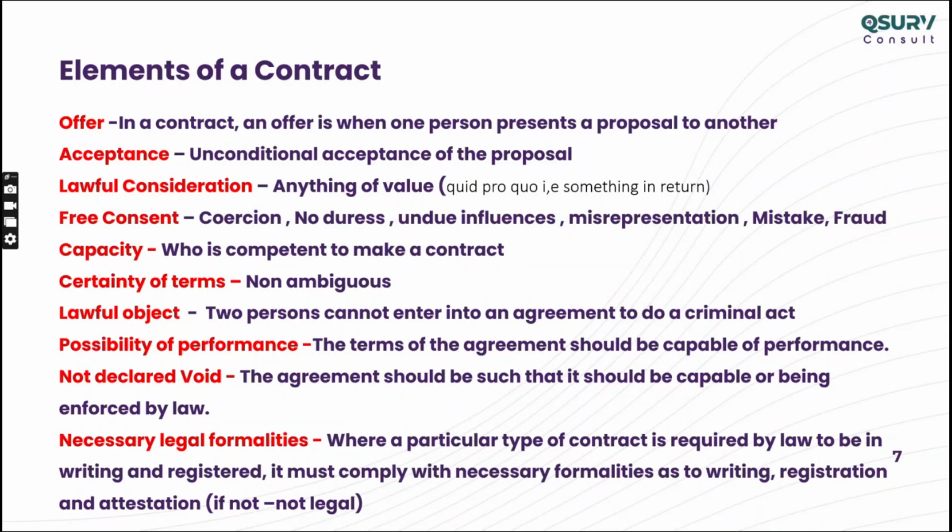Even if it's 1 dirham, the court will check: yes, consideration is not 0, it's 1 dirham, I'm okay, the contract is valid. That's it. He will not ask, you are considering this big building, why are you paying only 1 dirham? He will never ask that. He will look at the validity of the contract and say there is an offer, there is an acceptance, there is a lawful consideration also. That will be the full stop. Clear now? Yeah, it's clear.